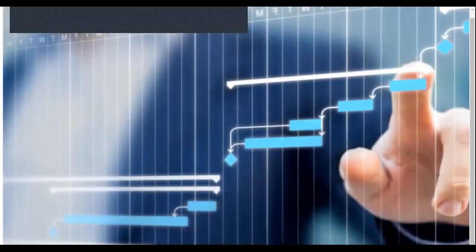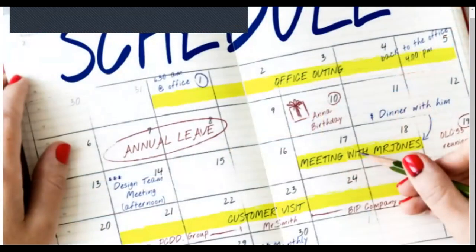Let's talk about our CTTCs for schedule management. I think the big one here is understanding what exactly we're trying to achieve. What are we trying to achieve? We're trying to create this detailed plan that shows people when things will be delivered on the project, when our deliverables and sub-deliverables are going to be delivered. Now, the project management team should select a scheduling method. They should select a scheduling tool that makes sense, that is on par with the size and visibility of the project, that corresponds with the needs contractually on the project if you're working for an external customer.